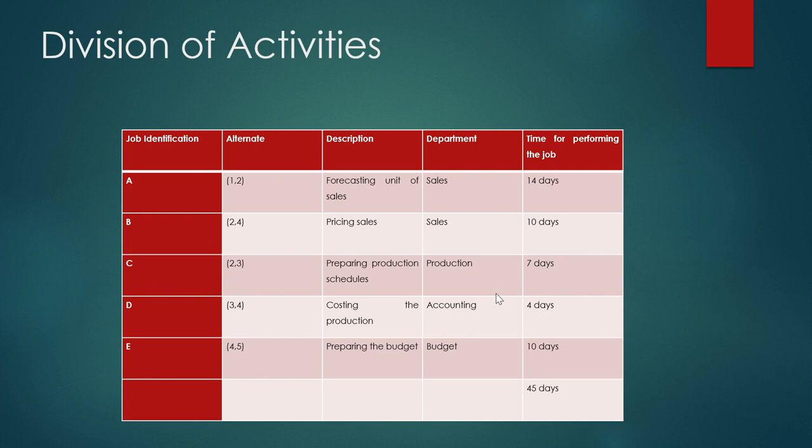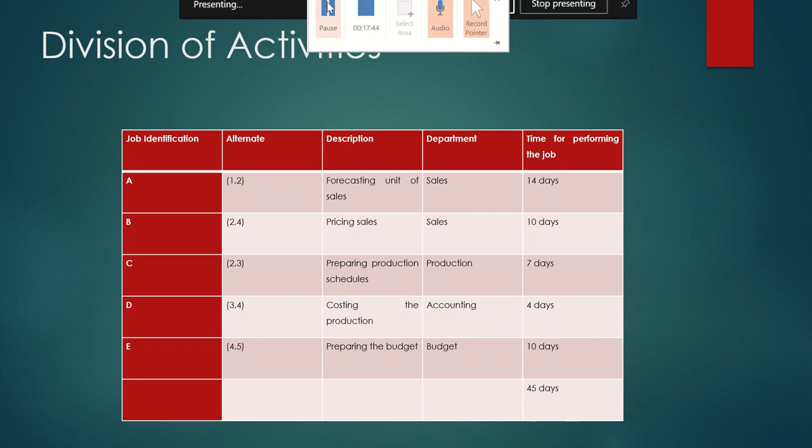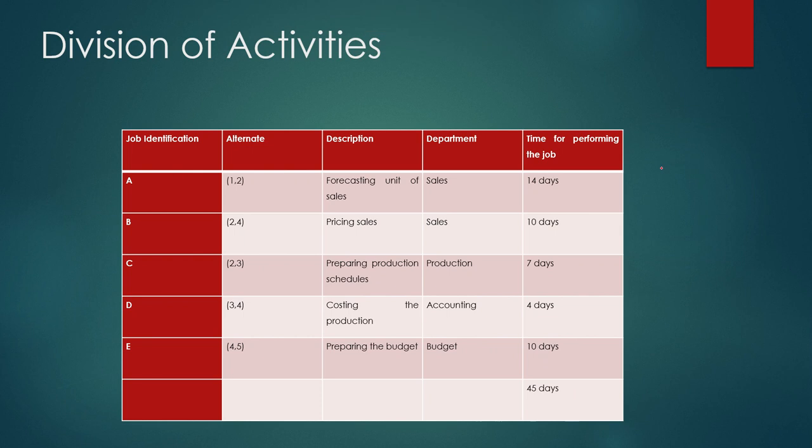So the whole project will take how many days? 14 plus 10 plus 7 plus 4 plus 10. It will take 45 days, right? So here what I am going to do is make a very small network. So, 1 to 2.